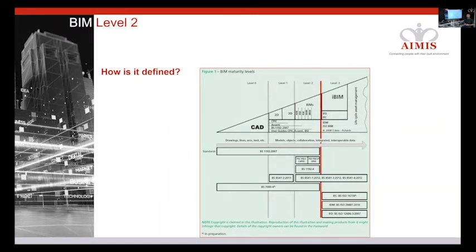This is the BIM maturity wedge, or the Bew-Richards wedge, named after the people that delivered it. This was designed to show a high-level understanding of what is required to achieve each of the 4 maturity levels, whether it's level 0, 1, 2, or 3. This included the modelling and data management processes such as 2D CAD and drawings of lines, moving on to 3D models, how you share those models in a common data environment, who's producing those models, are they being federated, and then level 3, the elephant in the room, which has never really grown in terms of a definition. That was sort of the future, and this wedge was defining that, and the standards are below the line here, which you would need to comply with in order to be at any given level of maturity.